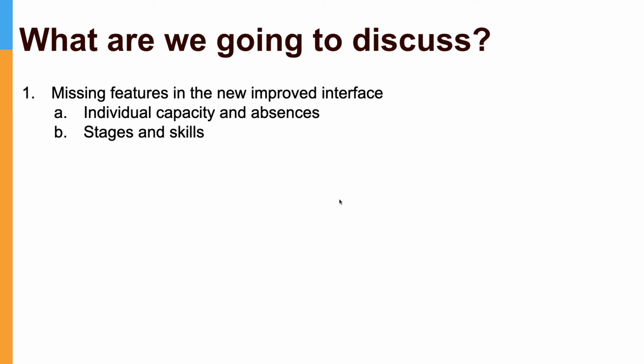So you can define those skills, and when you're planning your work, based on those skills, you can of course do the estimation. Let us say for doing deployment, you need the story points estimate to be 3, but you will be able to define that these 3 story points are basically for my deployment activity. And based on the estimation for those skills, the portfolio will help you pick up the resources or team members that are suitable for those activities.